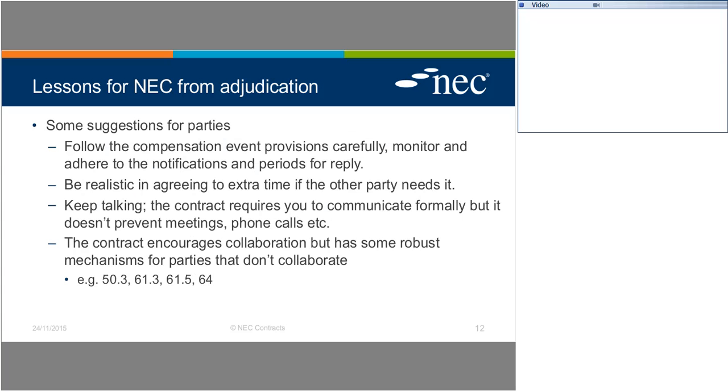Compensation events inevitably turn up in pretty much every adjudication you deal with. And it is no secret that the compensation event provisions can be lengthy, can be difficult to work with for new users, thinking particularly of Clause 63 and the assessment of compensation events. So it's important that everybody follows the provisions carefully. They monitor them and they adhere to the notifications and the periods for reply.